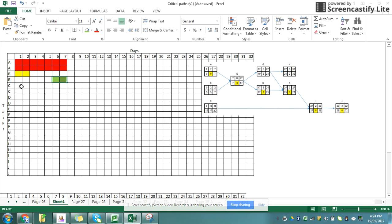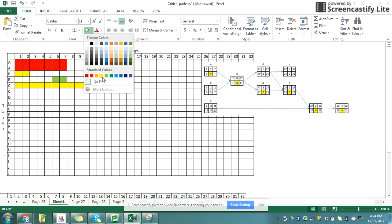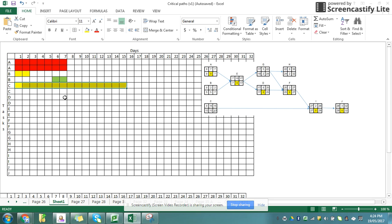I'm also going to do the same with C, so that starts after 0 and finishes at 15. And if I was doing it in the last one, it could start at 12 and finish by the time it's at 27.